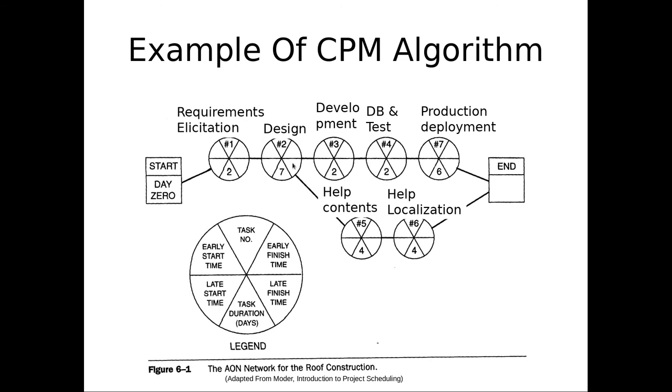Okay, so when do we have to finish this by to finish in time? On the backwards pass, this guy is 9. Yeah. This guy's 9 as well. This guy is 11. This guy is 9. So the earliest we could start this is 9. The latest we could start without delaying the project is 11. When do we have to start this guy? Or finish this guy? 9. By 9. Because if we don't start by 9, what's going to happen? We'll delay the project. Why?